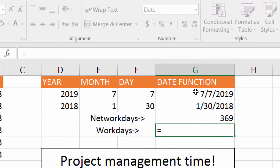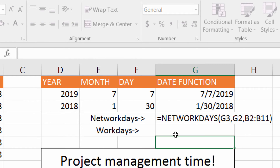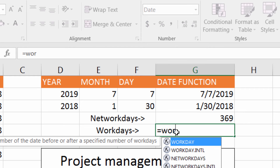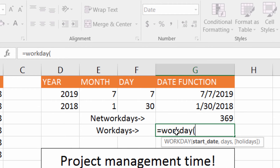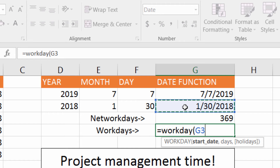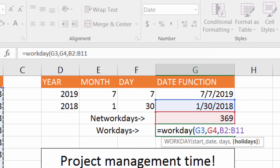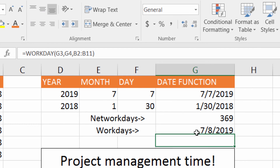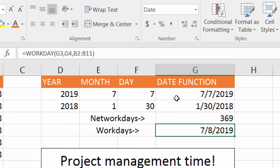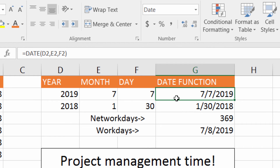Up here I want to give an example of that. I put in the NETWORKDAYS function — NETWORKDAYS takes your two dates and tells you the difference, and I even put in my holidays on that one. So what I'm going to do is put in WORKDAY with a start date, the number of days, and the holiday array, and press Enter. And I get the day after my end date. So just keep that in mind — the Workday function adds one to whatever date you put into it.